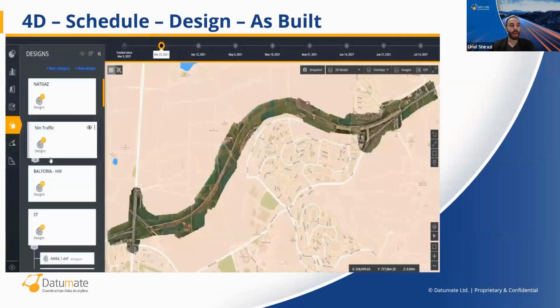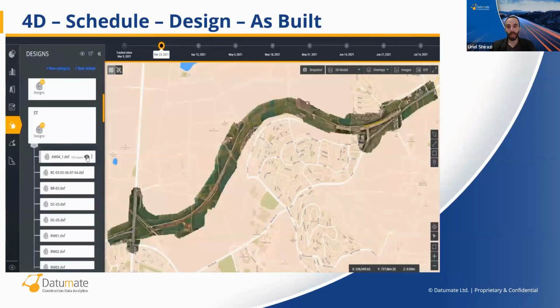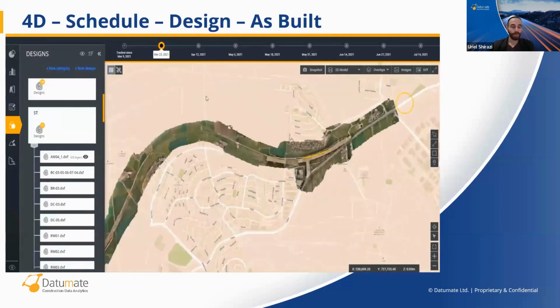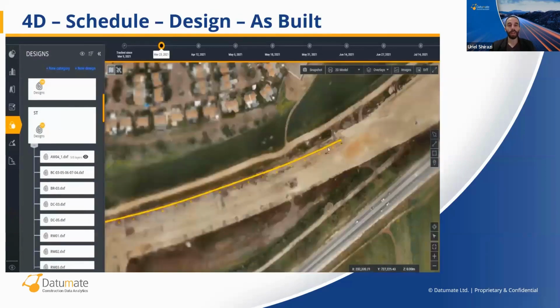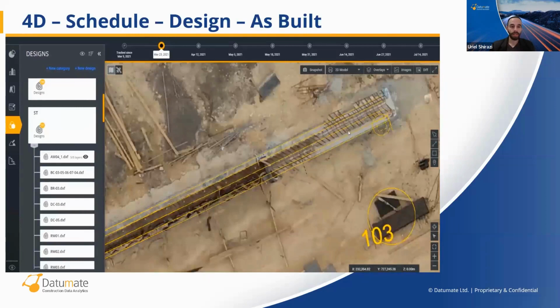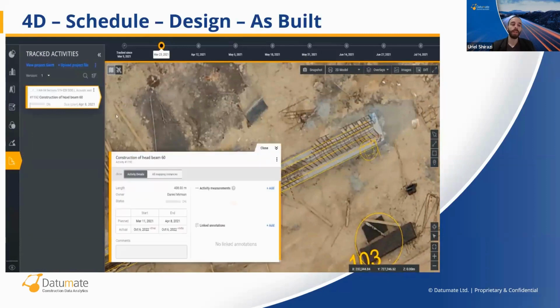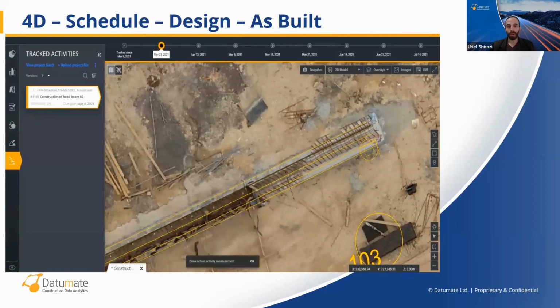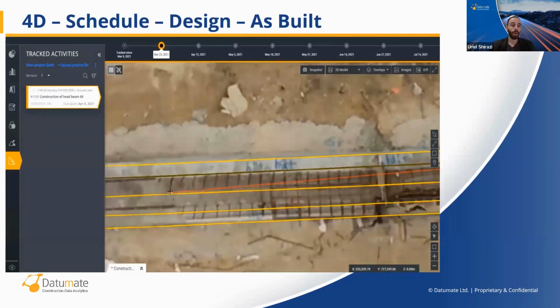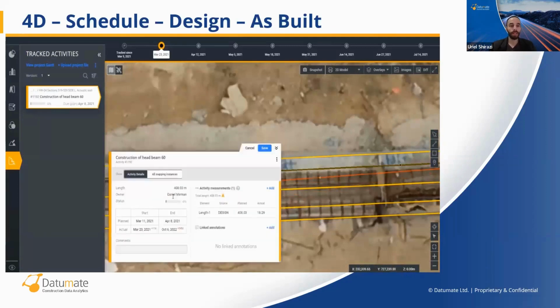After we uploaded the Gantt, now we connect the task to the design in order to track the activity. In this case, we chose a design of a supportive wall, a linear task. And now what the user does is report the progress in this specific flight of March. Currently the update is done manually by the end user from the office or home, but the next phase will be to automatically detect the changes.